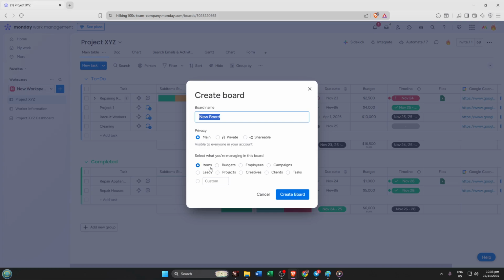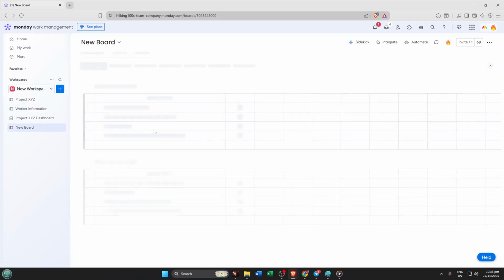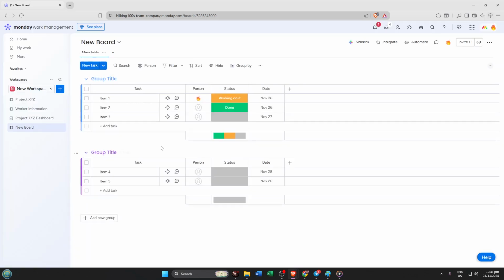There are a few popular approaches. You might want to divide tasks by workflow stages like To Do, In Progress, Review, and Done, which gives you that classic Kanban feel so you can literally watch your tasks progress visually. Or consider organizing by priority. Say, high, medium, or low priority. This lets your team laser focus on the items that really move the needle.